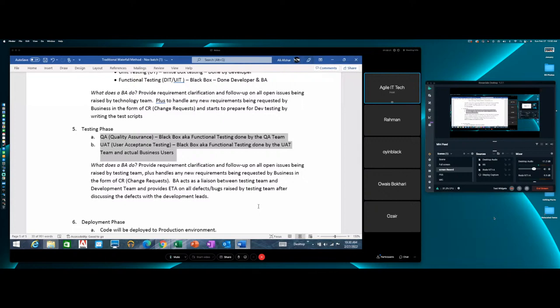And after 1 week of testing, the testing team is reporting 20 defects. And out of the 20 defects, 4 of them are critical, 10 of them are major, 6 of them are minor. Absolutely bad. Who do you think is in my office again? BA. And? Tech lead.